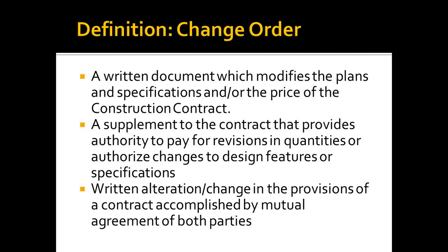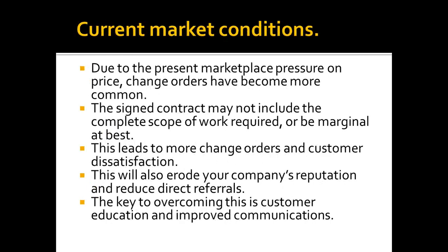Written alteration or change in the provisions of a contract accomplished by mutual agreement of both parties. Key part there is mutual agreement of both parties. And I think, again, one of the keys is to make sure that both sides, you and your customer, understand exactly what's involved with the change orders and what some of those costs are.